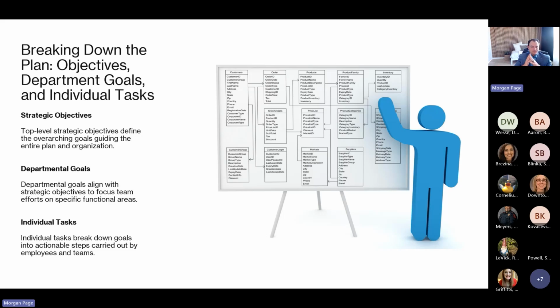And so my typical recommendation for people is to break it into 3 to start. If, as you get used to using it, there's a reason to separate it into another level, absolutely go to that. What you don't want to do is wind up separating it into too many levels right off the bat, and then signing up for that throughout the period. I'll always start with what's enough to get us through that 80%, and then iterate on that as you discover where you need more detail. And so your top level is going to be your strategic objective.